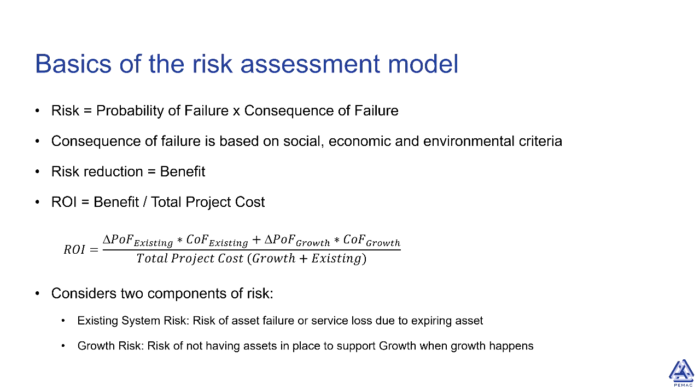So if we replace a pump that's very old, the benefit is that now we're not discharging wastewater to the environment, and we can quantify that. We can look at how much flow that is, what's the condition, and now we have a very real benefit that's a number.